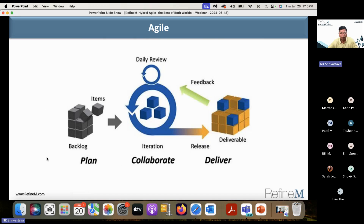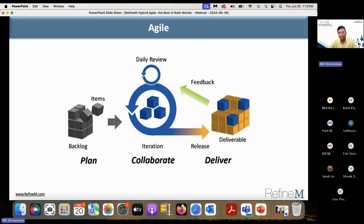Then you have agile, which is an iterative approach. You have your requirements in the form of a prioritized backlog. You take a smaller chunk of high-priority items and run them through a two or four week iteration cycle, create a deliverable, get feedback from the customer, and do a retrospective with the team. Then you go to the next iteration, and so on. During each iteration, the entire team meets every day to check progress on the goals of the sprint.